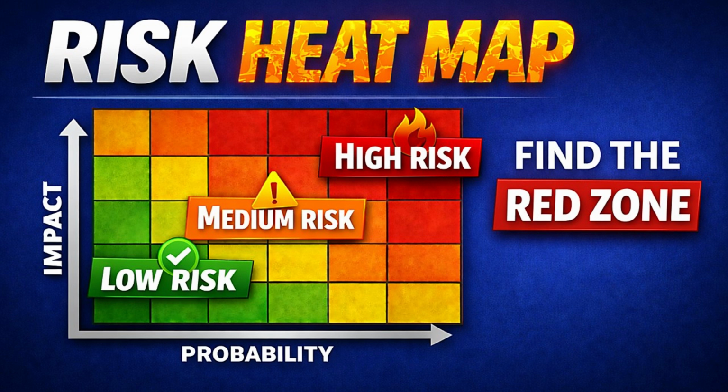Write the risk properly. What is the cause, the event, the impact? Rate the probability next, between 1 and 5. Rate the impact on a scale of 1 to 5: schedule, cost, scope, quality. Use a consistent definition. Plot it. Optionally compute the score, which is probability times impact, to rank. Set zone rules. Red means weekly actions. Amber means controlled watch. Green means light monitoring.